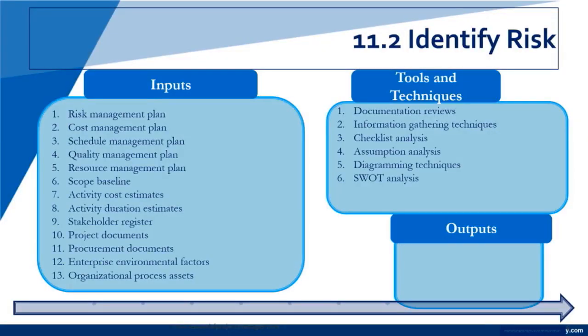We also use a technique called the SWOT analysis, which we'll go into in detail. Expert judgment is also used. The output is the risk register — the first major output of risk management after we've created the plan. We've designed the register so we know what items are in it, what information it contains, the format, and the structure. Now we identify risk, and the risk register starts to be populated.